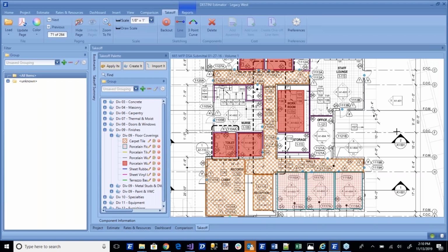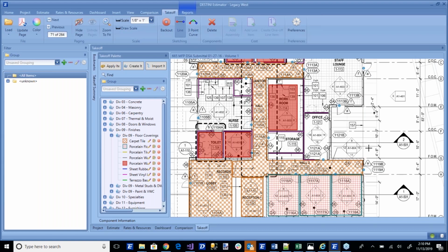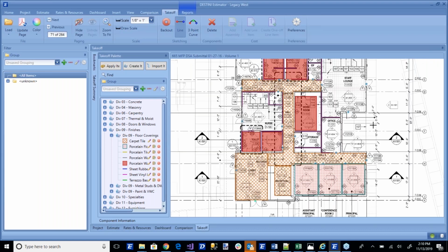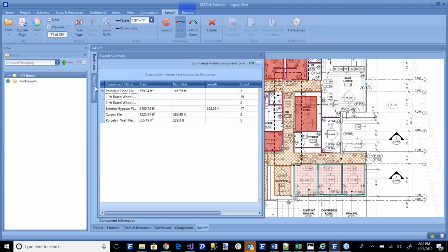The concept in other products around areas where you can classify each one of your drawn takeoffs for a particular floor, particular department, we've always had, but it was a little bit harder to use when you had to go to each and select each individual drawn takeoff on that page. So this, coupled with our takeoff summary, which you may or may not be familiar with, where you can bulk select and edit your takeoff, makes this a lot easier now.